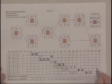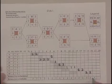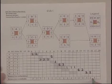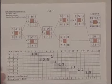And we see now that the project has been extended from 12 weeks to 16 weeks. And this often occurs when you have a resource constrained schedule. The duration or length of the project is extended.